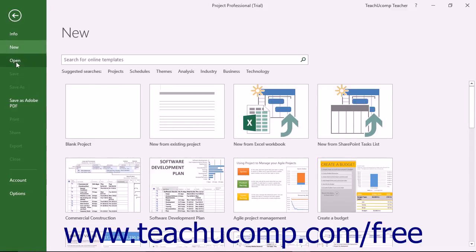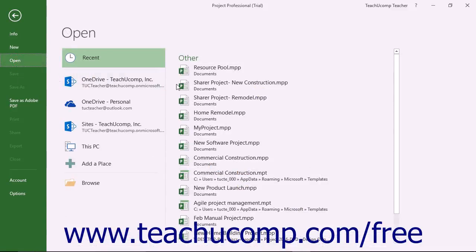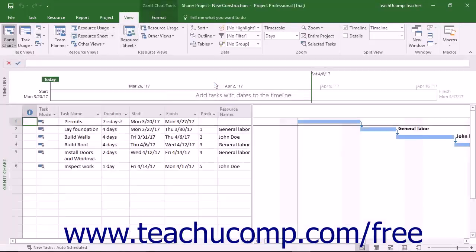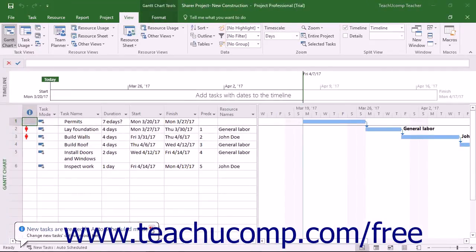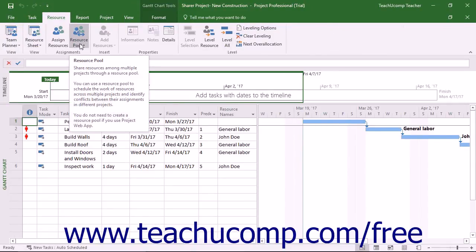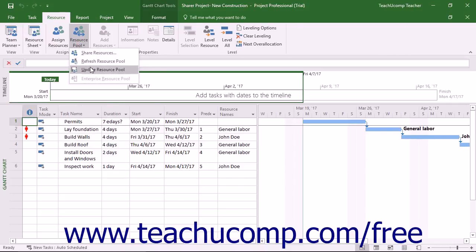Many changes within a project file, however, are simple assignment changes. When using sharer project files that are linked to a shared resource pool, you should open these files as read-only. You then click the Resource Pool button in the Assignments button group on the Resource tab in the ribbon, and choose the Update Resource Pool command to update resource assignment information within the shared resource pool.